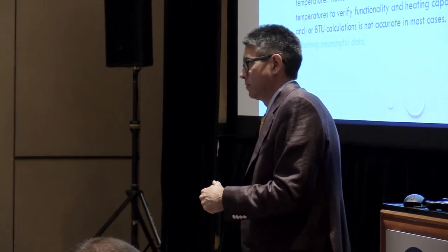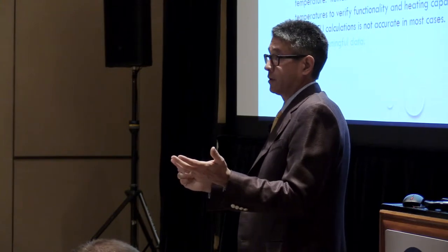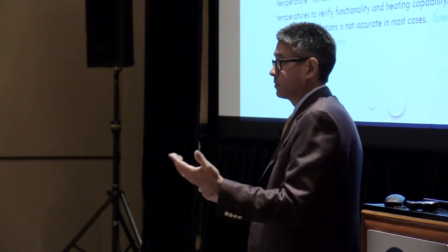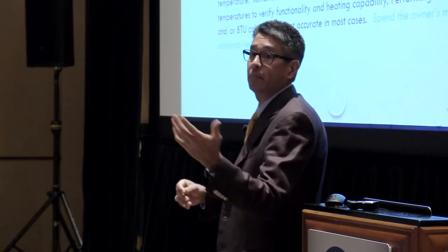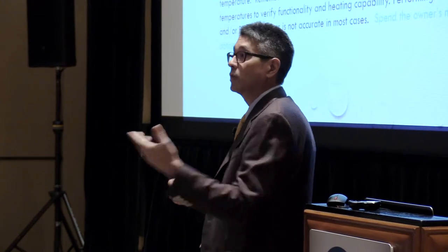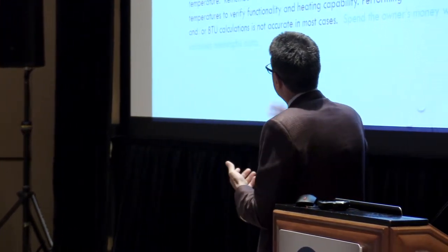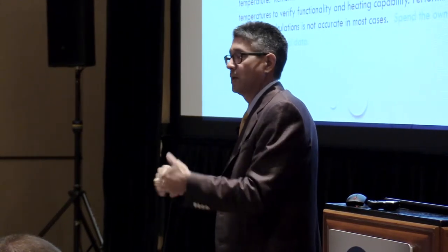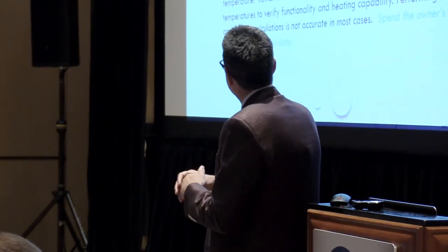A heat pump loop system, you might have to look at differently than a reheat water system, different than a chill water system, some scenarios like that. It might be the layout, or once again, it might be the schedule that dictates how you're going to look at that system and how we're going to balance it. So we can look and say we're going to open a floor at a time. Typically, that works well on scheduling. Proportion out that floor and make sure we have water flow on that floor.